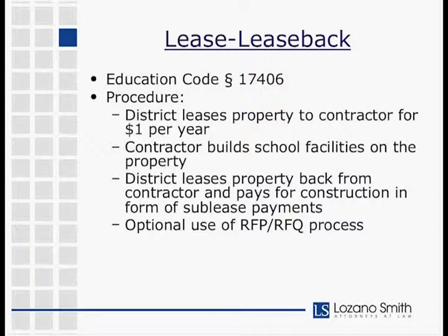It's optional also to use an RFP, or request for proposals, process to select your contractor. Although that's technically optional, we recommend it because obviously the district wants to make sure that it's getting the best deal or competitive pricing for its project, but also there is some public perception that tends to be negative towards lease-leaseback, and you want to make sure to avoid an impression of favoritism or something along those lines.